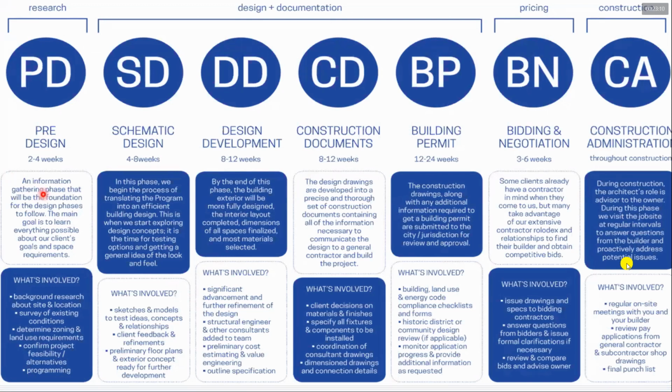So pre-design is a phase that takes 2 to 4 weeks. It gathers information and does background research about the site and location, surveys existing conditions, determines zoning and land use requirements, confirms the feasibility of the project, and provides you with an alternative and better list of requirements, that is programming. So the main goal is to learn everything possible about your client goals and space requirements along with the site conditions.